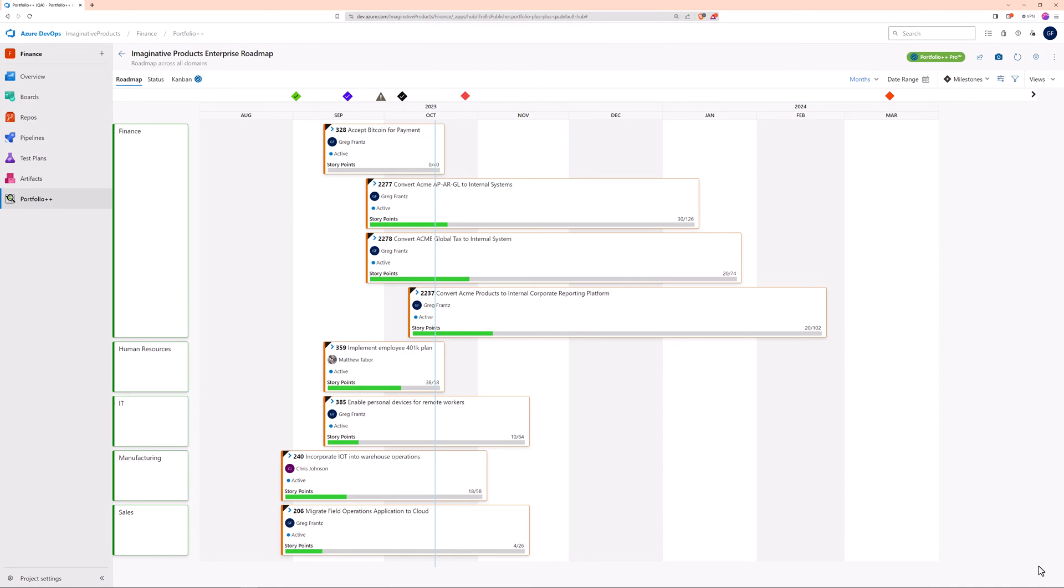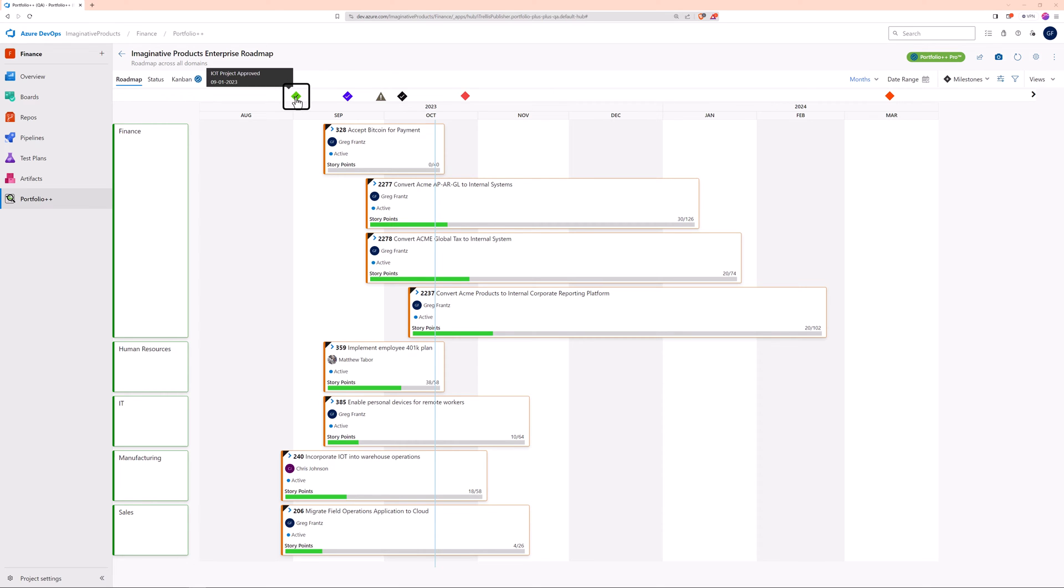For milestones that are not linked to work items, when the milestone date is in the future, it stays empty. Once the date has passed, it will automatically get a checkmark since it has no incomplete work items.